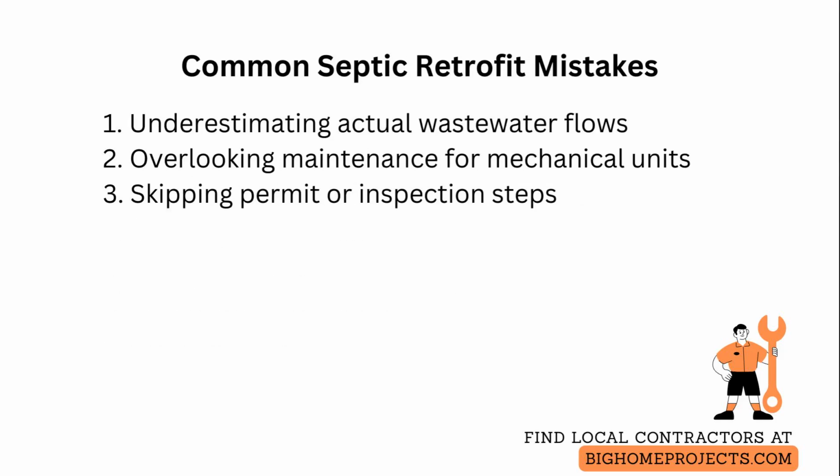Three common mistakes are underestimating actual wastewater flows, which leads to undersized upgrades, overlooking maintenance needs for mechanical treatment units, which causes early failures, and skipping permit or inspection steps, which results in costly rework or fines.